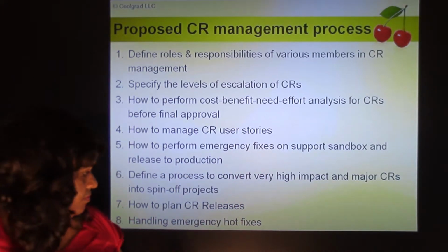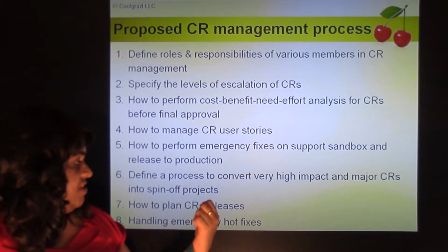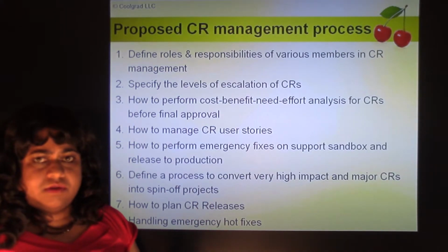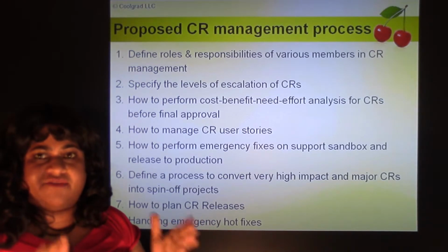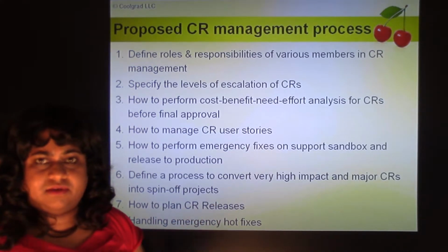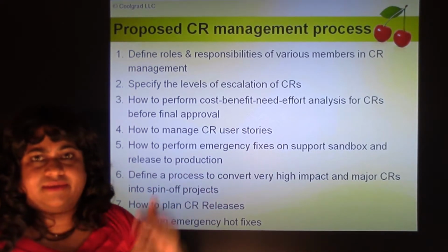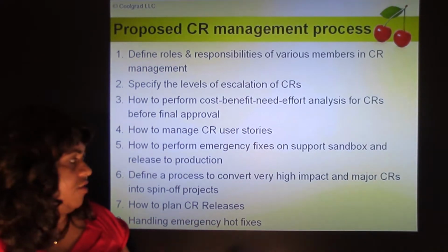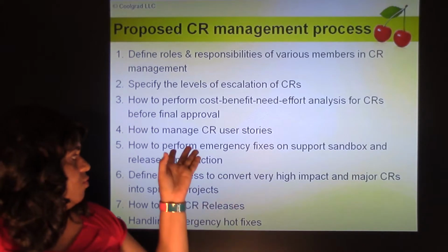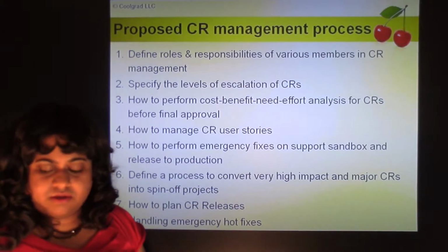It happens. How to plan CR releases. So these change requests are grouped, and when a sizable amount is done, like say every quarter, they might have a CR release. So you want to plan how these change requests are released. Handling emergency hot fixes. So, it was similar to what we talked about here, firefighter CRs.